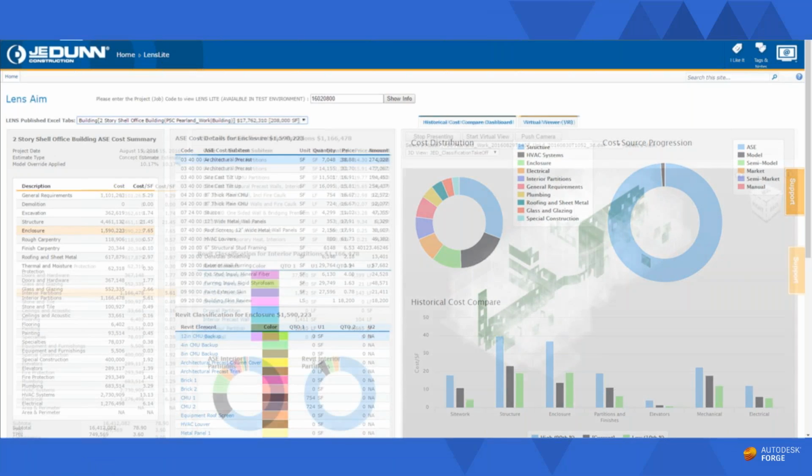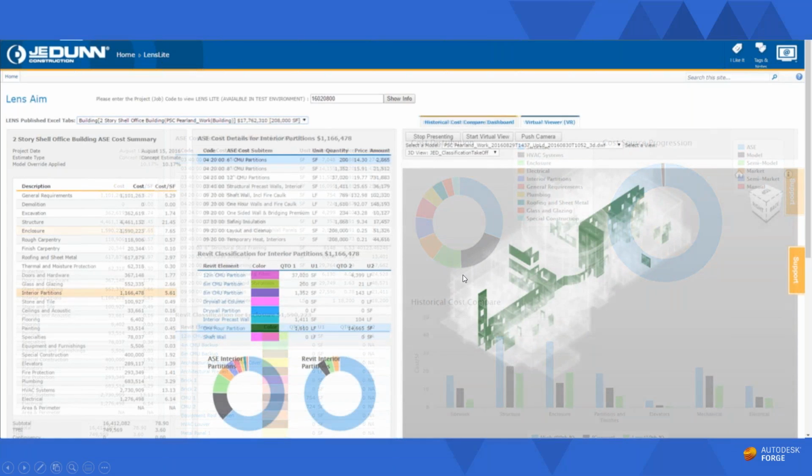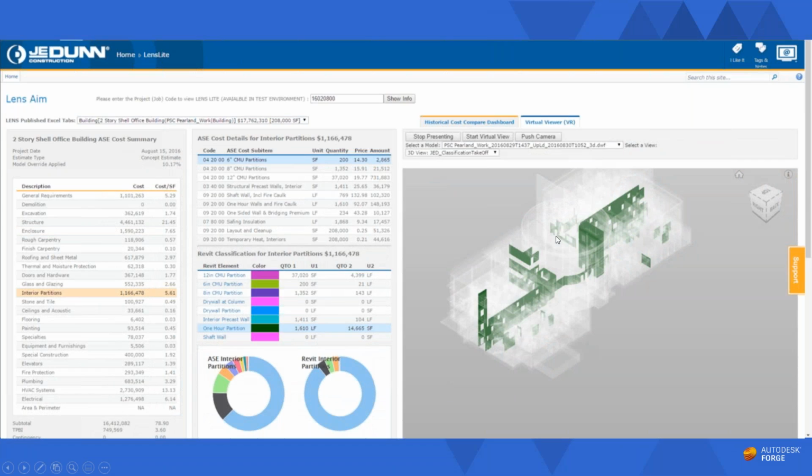So essentially, it means that they've got the design and they're going to go like, right, what if we do the double glazing and replace it by triple glazing? What if the wood is going to be replaced by aluminum windows, etc., etc.? But obviously not just for windows, for just about anything. So they're using that viewer and they're hooking it up to their cost system and they're just doing what-if analysis. So this is then being reviewed, and in the end, you get like alternatives that are really ready to replace if and when it is needed, actually.